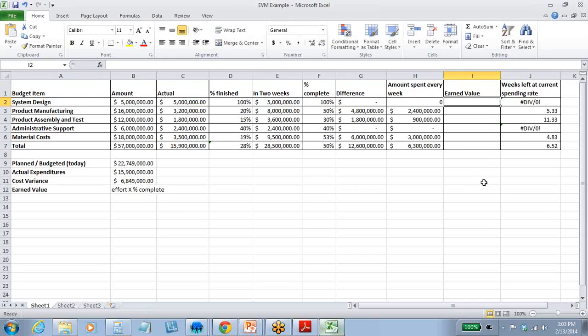Okay, good, thanks. How about the $3.6 million in administrative support? Since we don't have any information, what you do is you take it at current values, and that'll be updated as you get closer to the end of the project. Okay.